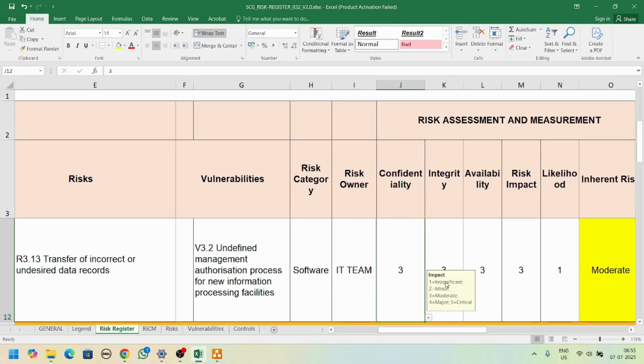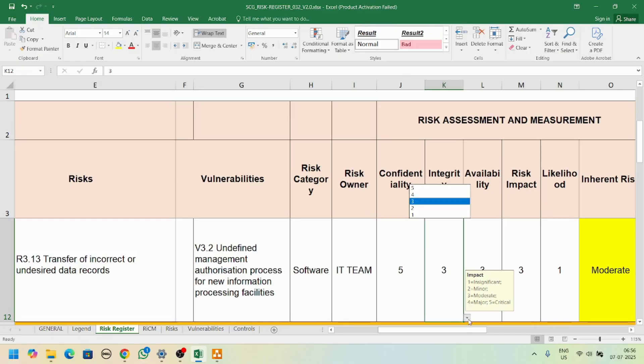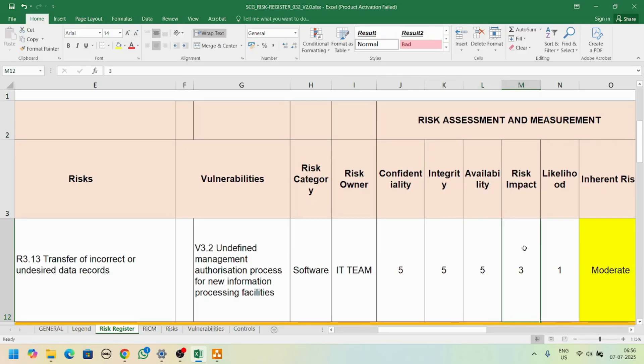We have here CIA - confidentiality, integrity, availability. These three factors have a rating from one to five: one is insignificant, second is minor, moderate, major, and critical. If you select five, it means confidentiality is critically impacted. If you select five for integrity, it means integrity is critically impacted, similarly for availability.